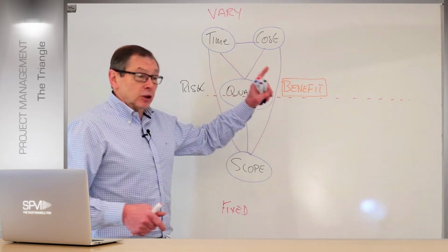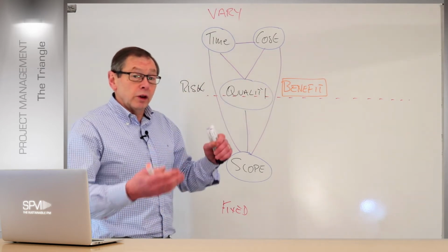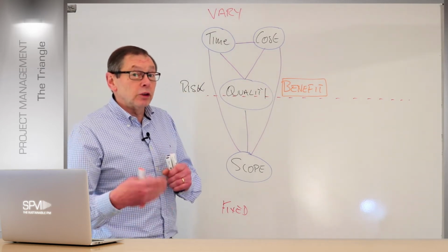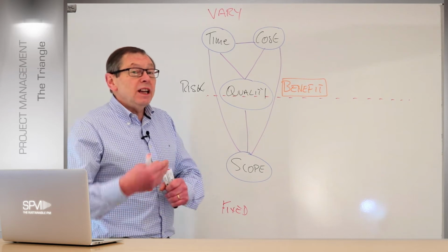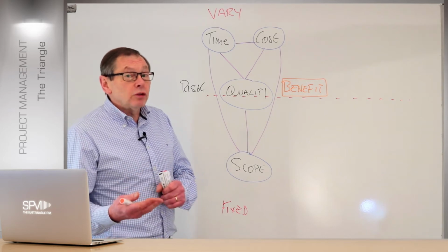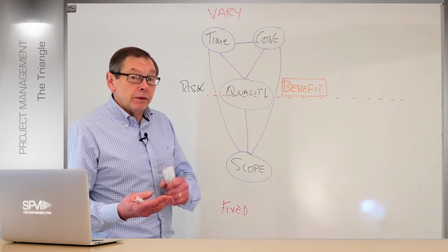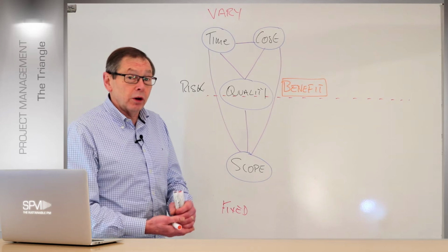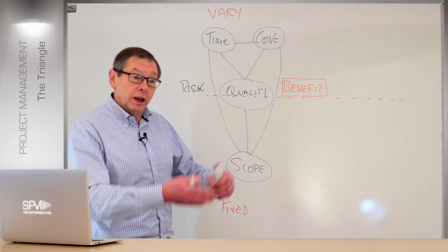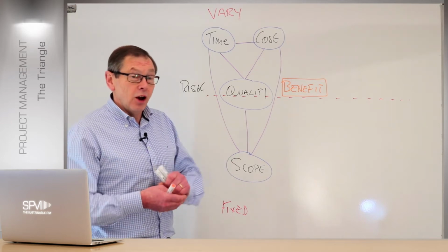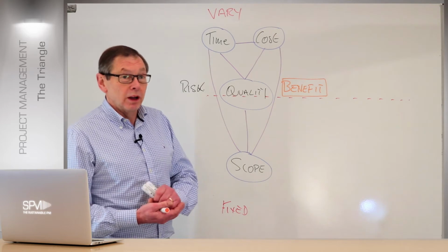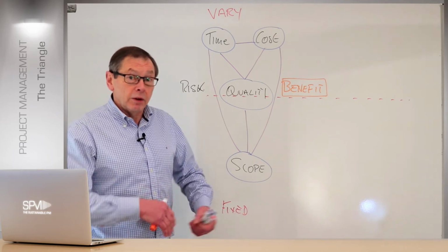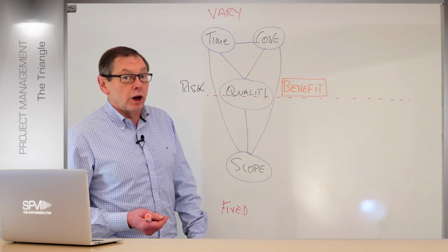So we have benefit because obviously as we monitor the project, we want to ensure that as the project is building the solution, it looks like it's going to indicate what it might do from a point of view of realizing those benefits once the project's closed. Because we can actually look at deploying some parts of the solution during the project and seeing if that's actually working or an indication of how it might work. Might not get the full benefit right now, but the idea will indicate whether it might work afterwards.